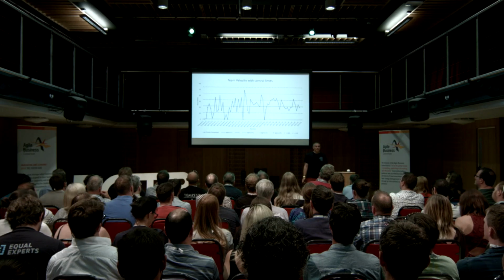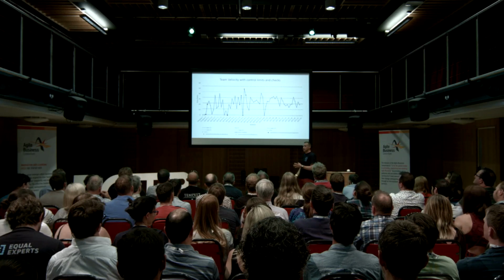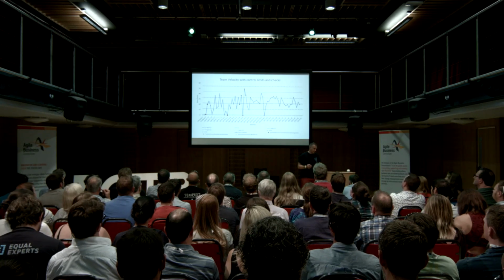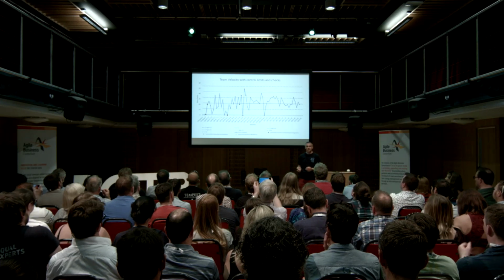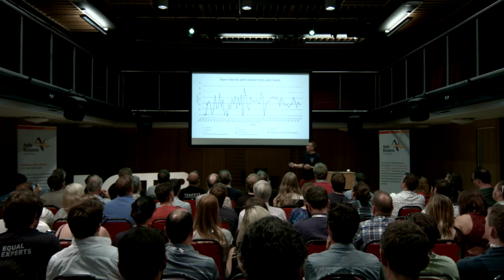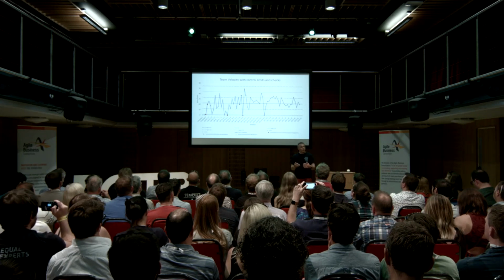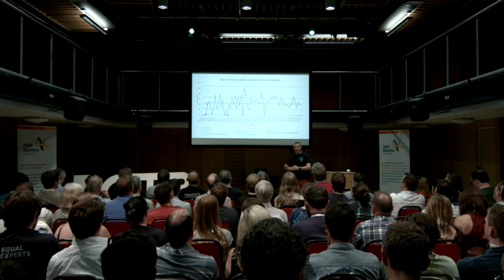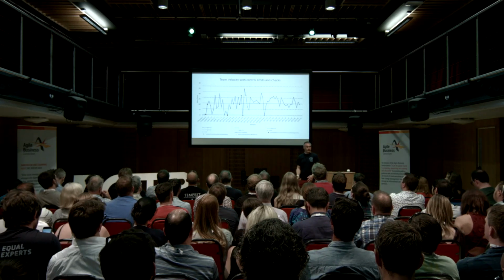So let's look at this example when we apply the control limit algorithms to it. It highlights a few points. So we'll talk about these points. We've got these red squares, and these are highlighting abnormal patterns. These are highlighting that 2 out of the last 3 points are outside the 2 sigma limit. So this indicates that there could be a trend here, that your velocity is lower than you'd expect for a randomly distributed piece of data.